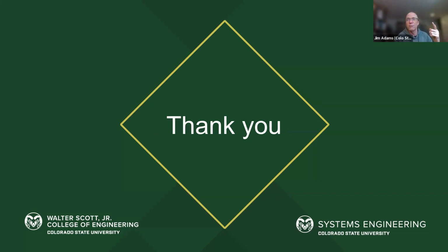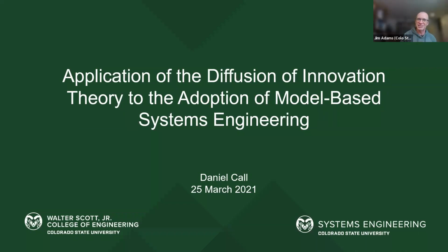But it would also make you think ahead. What's the risk that we're going to discover these things? And then maybe the risk is so great that the testing needs to start earlier, or we need to have a different way of planning and executing it.